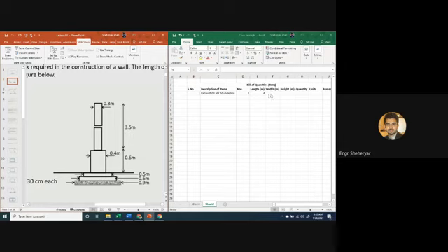But actually we were talking about the width of the excavation. So how can you find out the width of excavation? You have to incorporate this PCC in the excavation. So just imagine if you are excavating the ground having a width of 0.5 meters.